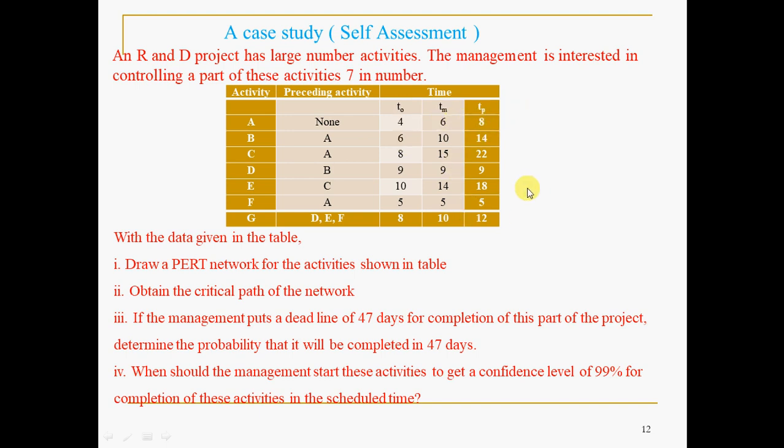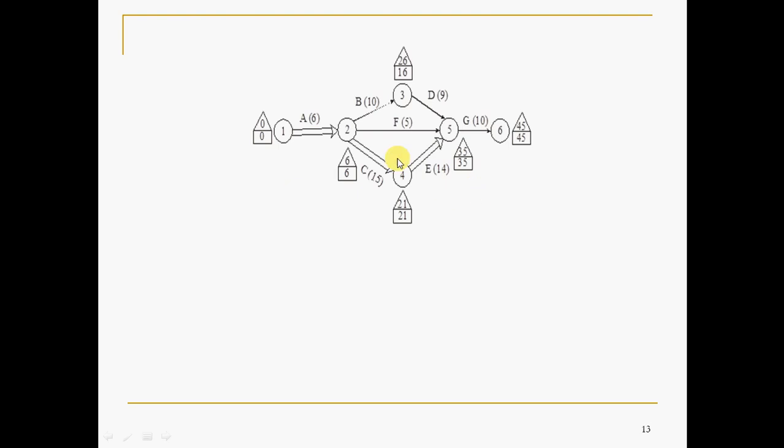TE, that is by using the statistical equation. So you have to get the TE. That only you have to write here, not all the 3 time estimates. And of course, as usual, as we discussed, the square box and triangle box you can calculate. And how many paths are possible, critical forward paths, 1, 2, 3, like the path whichever gives the longest duration is the critical path, and its corresponding length, that is 45 days, is the project duration.